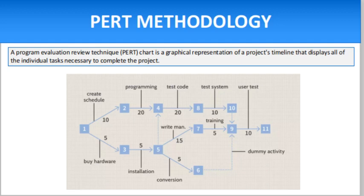Items at the same stage of production but on different task lines within a project are referred to as parallel tasks. They are independent of each other and occur at the same time. A PERT chart is a visual representation of a series of events that must occur within the scope of a project's lifetime. The direction of arrows indicates the flow and sequence of events required. Dotted activity lines represent dummy activities — items located on another PERT path. Numbers and time allotments are assigned and shown inside each vector.